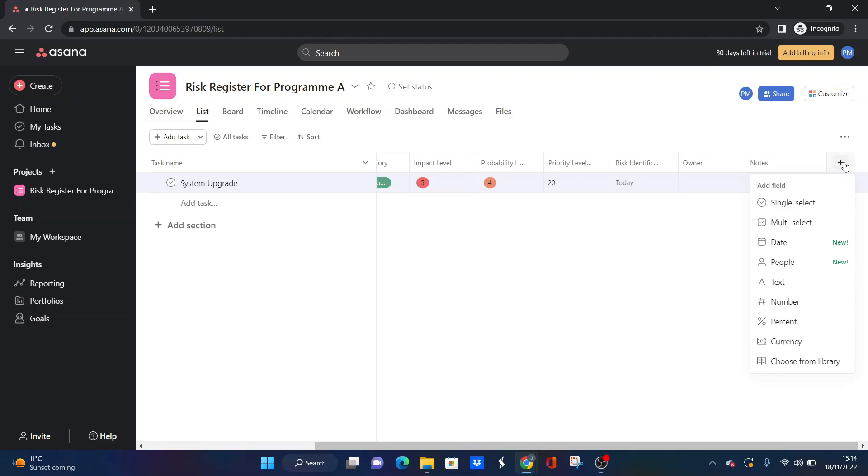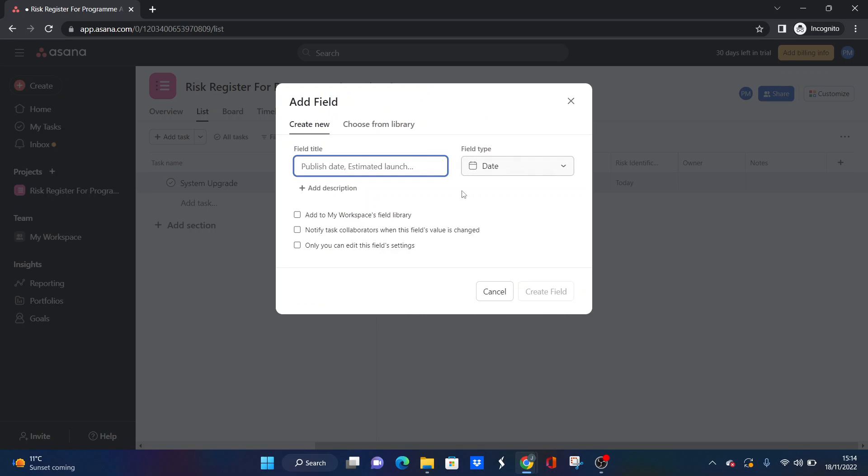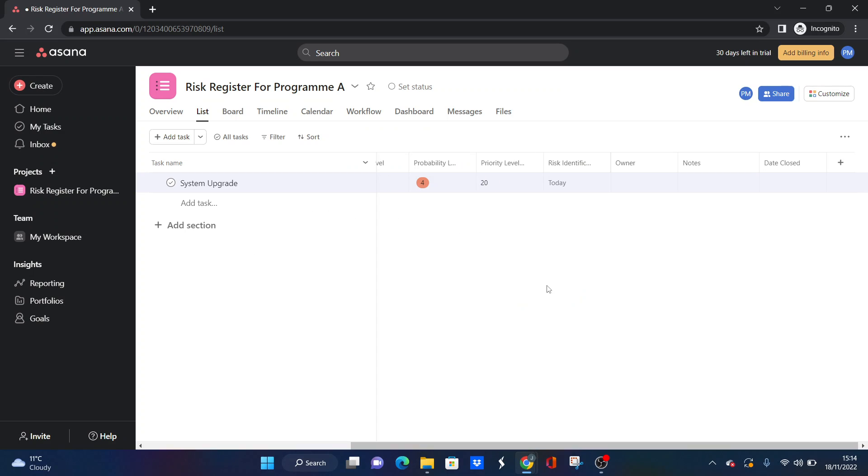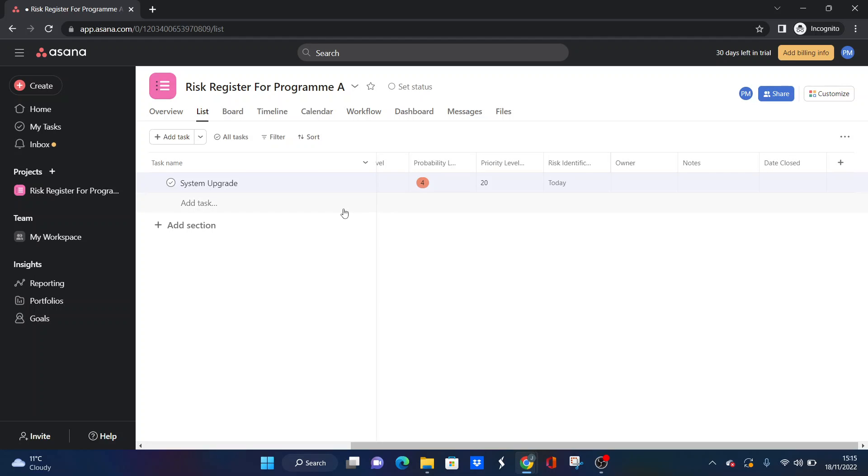Now, the final one is going to be date closed. So we call this date and date closed. Of course, if the risk has been addressed, then this is where you'd simply put it in. And if this is empty, the risk is still obviously ongoing. If there was a date in here, you then could put it into the section such as closed risks or outdated risks or risks we're no longer monitoring, et cetera. So that is, in essence, a risk register. And that's setting it up using the functionality of Asana.